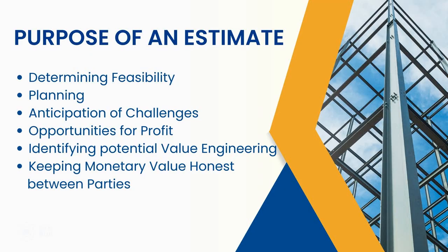We use estimates for our planning. So once again, planning of whether or not this job is going to be able to move forward and that it is feasible. But we also use our estimate in being able to plan different segments of work, different volumes of money or budget that we may have available during different parts of the project. And so if we're going to be short on money towards the end of the project, we're going to know early enough in the progress of the work when we have to go and request additional funds, or when we have to look at bonding, or whatever your funding mechanism is going to be.